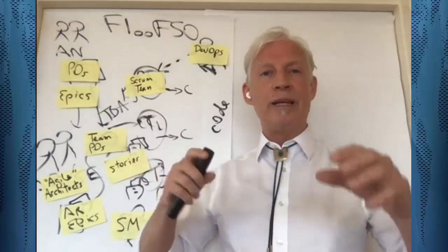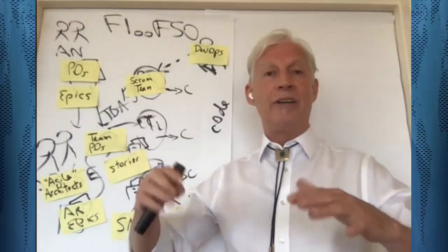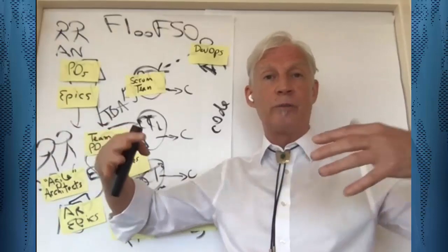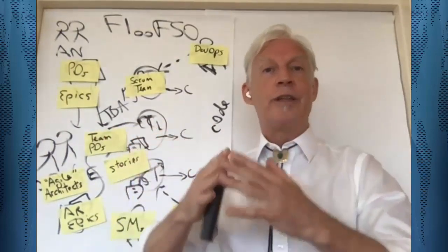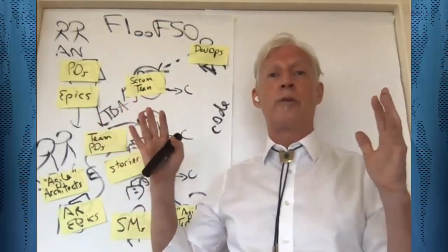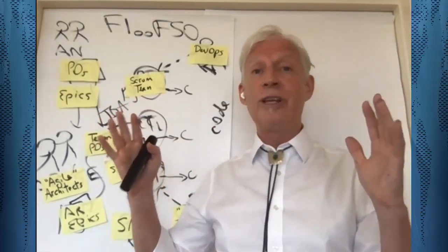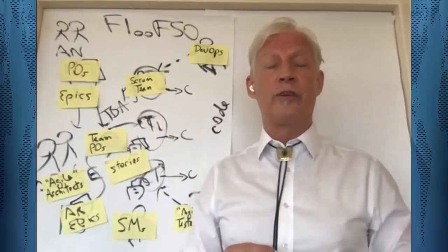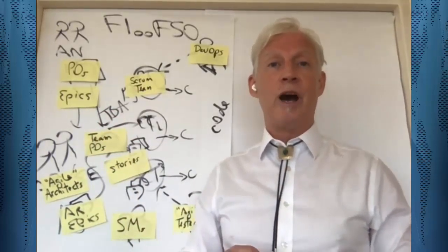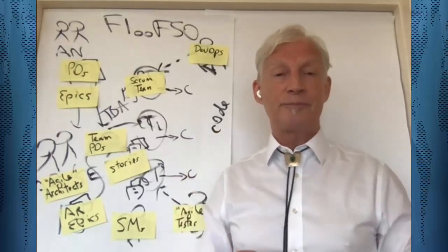And if you've got many little so-called products, and to deliver something to the external customer, you actually have to integrate many of these little products together, then that's causing an increase from the global perspective, seeing the whole. And therefore, little products is less consistent with low cycle time and high adaptiveness at the global level.